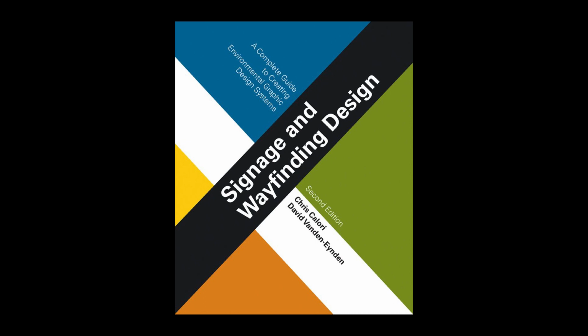In either case, sign type revisions are tedious because they must be tracked and updated in the schedule and perhaps the plans as well. That said, if sign typing was carefully considered during Phase 3, the need to revise sign types during Phase 4 should be minimal. But there's always the possibility that the definition of a given sign type needs to be changed, or that a type needs to be added or deleted for the final project documents.